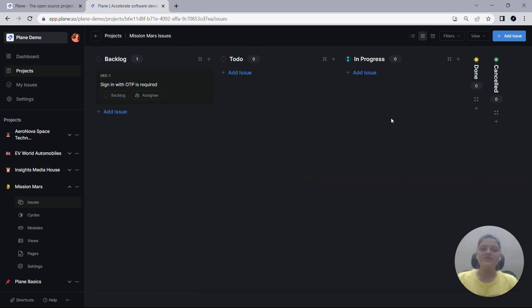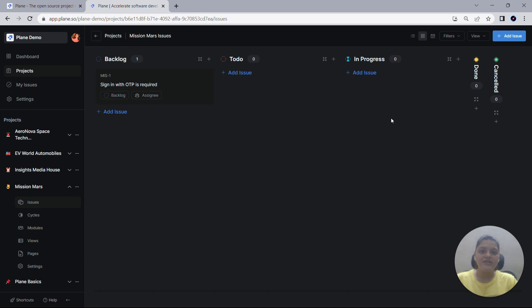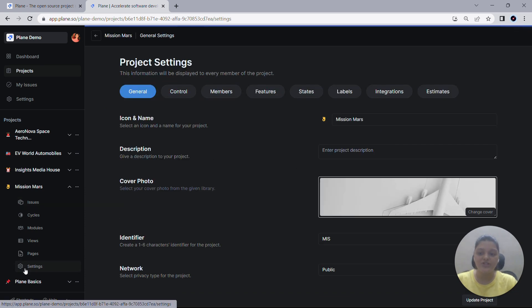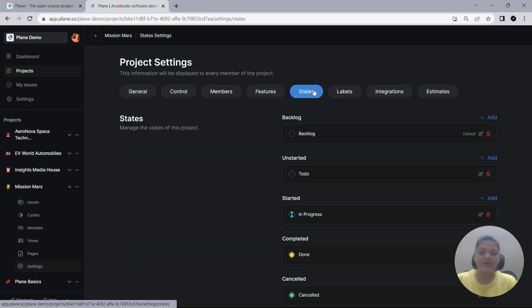Now let's talk about states in Plane projects. Project states define how a work item or an issue progresses from its creation to closure. These states define the user stories and describe their progression. When you create a new project in Plane, we have default settings that automatically populate the states with five predefined options, each of which is self-explanatory.